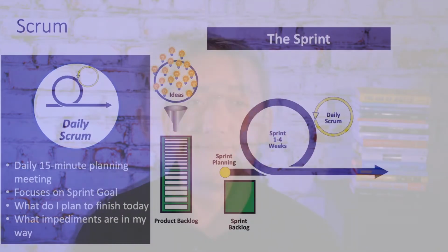During the sprint, user stories will be getting completed by the team. As this happens, the team members should be reviewing the finished work with the product owner to ensure that each story is passing acceptance tests and that the definition of done is met. It's the product owner who will acknowledge if the work meets the user story requirement. Once the story is accepted, the team member will move on to the next user story. This is typically the next most important story on the sprint backlog.